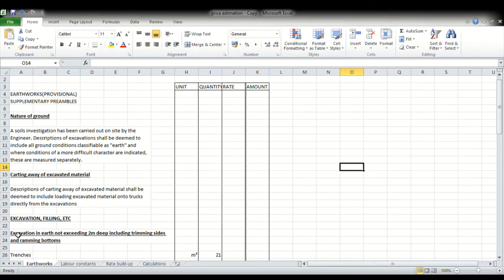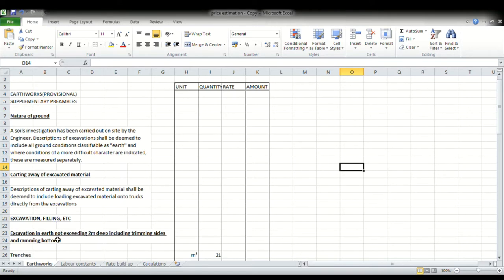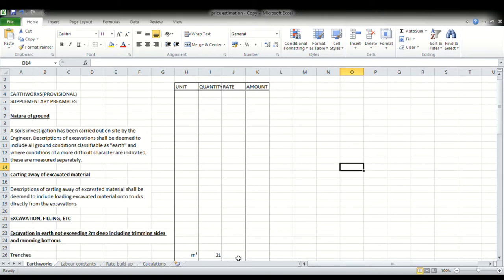This is a typical example of a section in a bill of quantities. The trade there is earthworks and it's measured provisional. This is usually the first trade in the bill of quantities and it deals with site clearance, excavations, filling, etc. Now the reason I'm showing this to you is because we are going to work out a rate for the first item, which is excavation in earth not exceeding two meters deep, including trimming sides and ramming bottoms. The quantity surveyor determined for our trenches, which is 21 cubic meters.